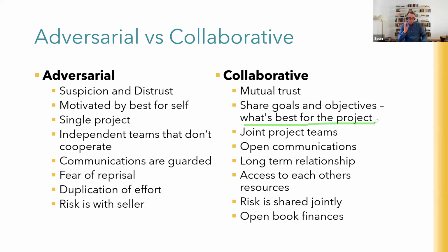The best project I've ever worked on was a 2.5-year large-scale urban redevelopment project for a local council. It was an alliance project. We brought that project in early and $1.5 million under budget on a $20 million budget. We delivered much more than was expected because it was an alliance and everybody on board worked for what was best for the project.